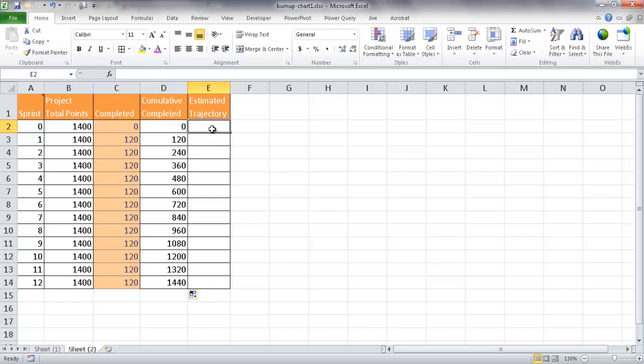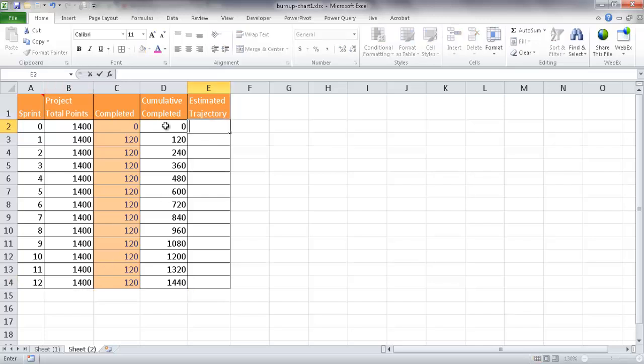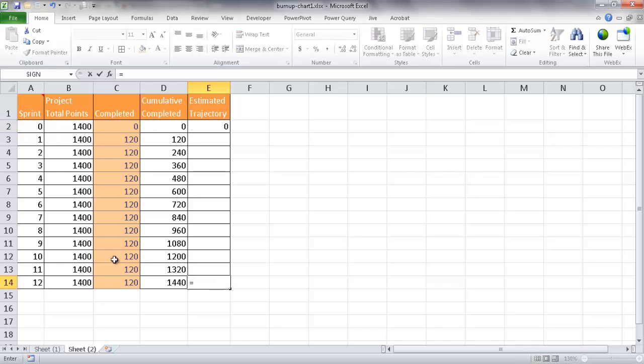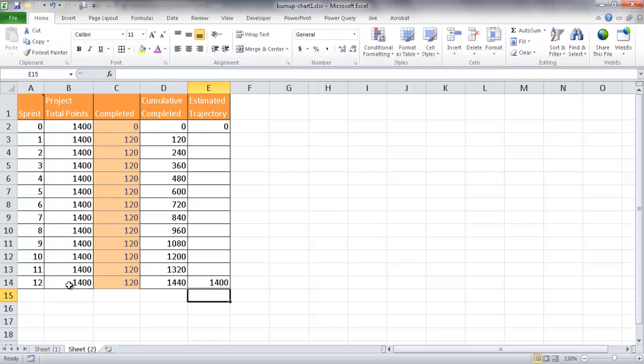Now, the estimate trajectory, that's going to be our estimate from zero to that end period. It should be 1,400. So this is going to equal zero here. And the last value is going to equal the total points. What we basically want to see at the end. All right. Now, with the rest of it, we're going to have to add a kind of a null value in here. Otherwise, it would not be charted correctly.